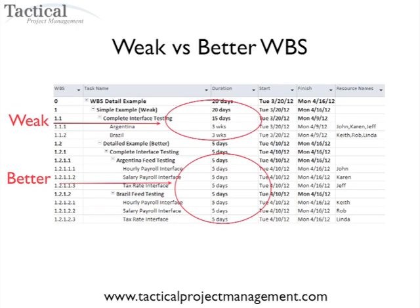Let's look at an example. In this slide, I have some work being done over three weeks where we're doing interface testing with Argentina and interface testing with our Brazil system. I've assigned a duration of three weeks and assigned John, Karen, and Jeff to do the Argentina interface testing, and Keith, Rob, and Linda to work on the Brazil interface testing. The reason this is weak is that within a span of three weeks I don't have much visibility into what these resources are working on or their capacity to take on additional work.